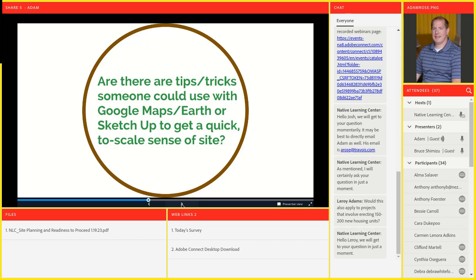So this might be a big project in itself to do 30 units, but to think of the funding and the resources for a 100-unit project, if you can start to break that up into more manageable chunks, what you could potentially do is a first phase as a tax credit project. Maybe it's a second phase with some other funding resource that you've identified for middle income housing. Maybe there's a competitive IHBG that helps fund a portion of the project. So starting to break it up into more manageable, smaller chunks, I think that's a good way to do it. Bruce, do you have anything to add to that?